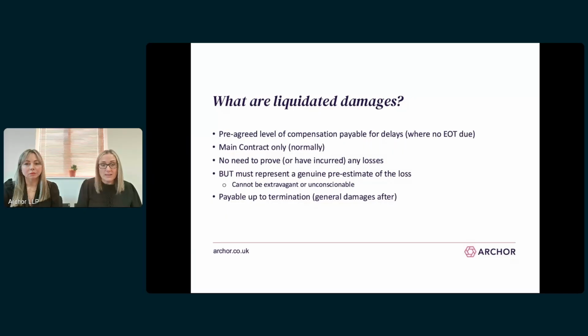So generally, subcontracts don't contain liquidated damages provisions. Rather, if a subcontractor causes delay, general damages kick in, and then the main contractor can recover all of its losses as long as it can prove those losses. That's not to say LDs can't be used in subcontracts. They sometimes are, but it's relatively rare.